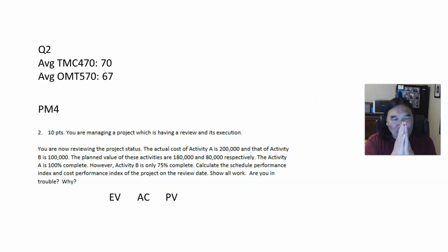So if I planned on spending $500,000 and I'm only 20% of the way through it, it means that I was planning to spend only $100,000 after 20% of the way through. That's it. On the other hand, that spending might not be linear. If it doesn't tell you, then just assume it's linear. But in a lot of cases, it's not linear that you scale your spending. But somewhere they've got to tell you where they plan that value.